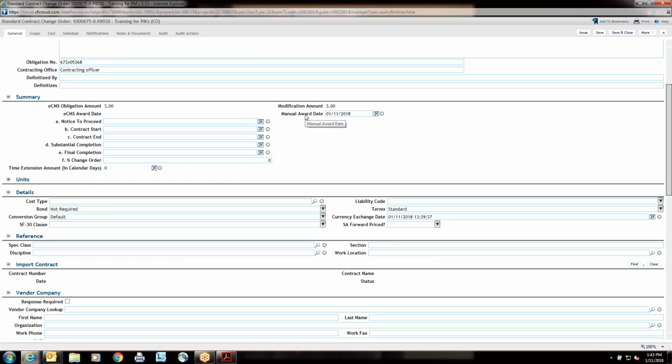And then we go into your time extension. The other dates, if you want to populate them, if you have them, you can. But if this change order is for a time extension, this is where you apply that time extension. If we were working with a PCO or an RFQ and it had a time extension, we're going to automatically populate this based on that RFQ that was submitted. Or potential change order as well. So we're working on getting that automation done.